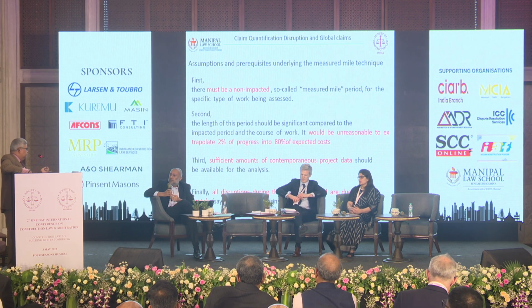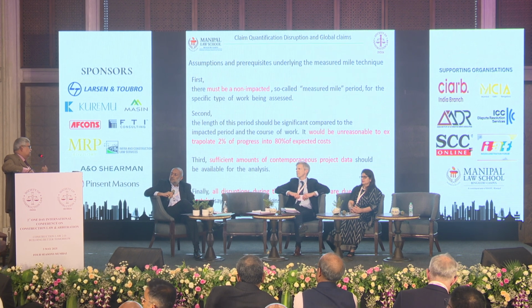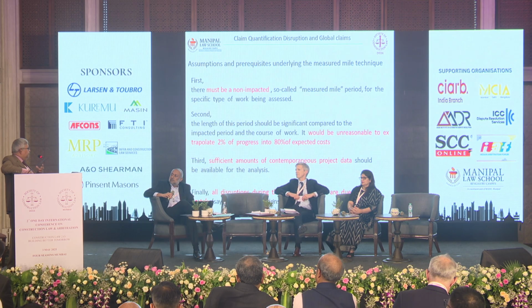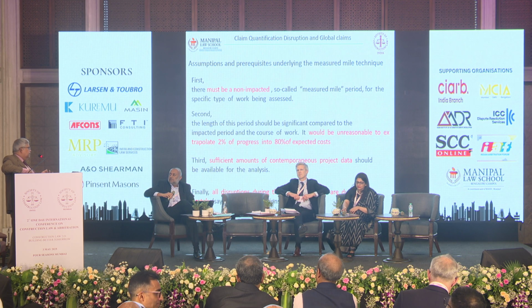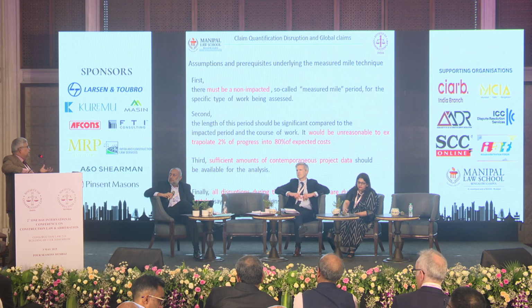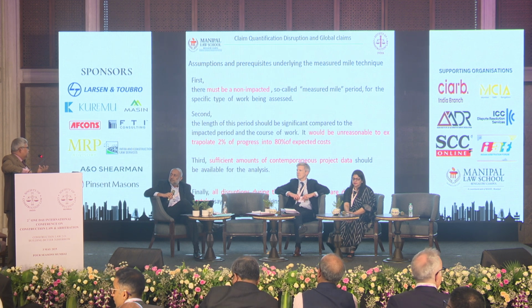Yes, actually that is coming in the global claims. So where the judgment is, the first thing, whenever the contractor is claiming for a disruption or a global claim, what normally the tribunal or the employer will look for is, he was L1, but what was the difference between the L1 to L2? If that is 25%, he is underquoted. That means at any cost he wanted the project, so he made his own miscalculation in working out what kind of labor hours required. So he has to prove that there was a better chance for him to make a profit, but for the disturbance caused by the owner. I think that starting point is that.